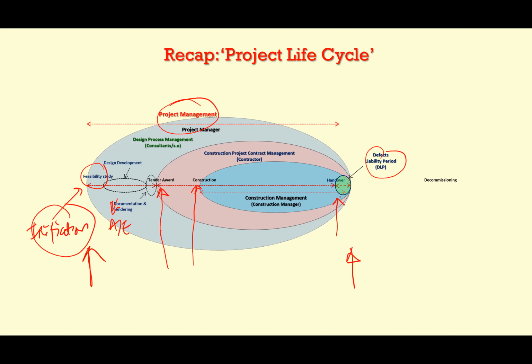And then when the contractor hands over, this is what we call the practical completion date. That is the period the contractor has to complete all the requirements of the client. Let's say the client asks for the project to be completed in 2 years. That will be 2 years between the site possession and the practical completion handover. You notice there is some wording here, construction management.